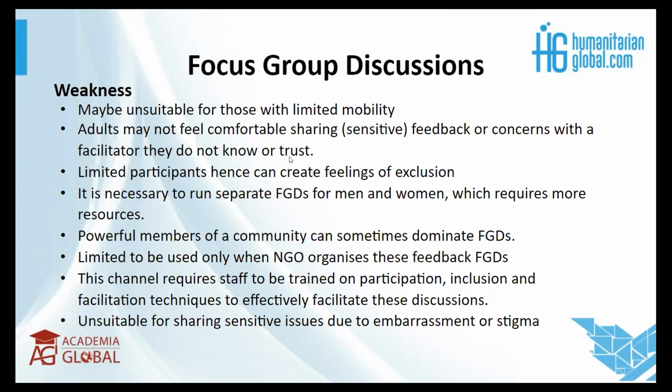Of course, it depends also on the type of project and the type of feedback that you want to seek. That will speak to the sample in terms of age and the different diversity, maybe the literacy levels, or if, for example, these are pregnant and lactating women, the different age groups and the ages of their children. So this should be really narrowed down, and you should be able to identify these people. It should be random. Of course, you already have the criteria, so you're purposive, but still random in that the persons who have been selected may not necessarily be part of one family. They should be part of that village, but different households.